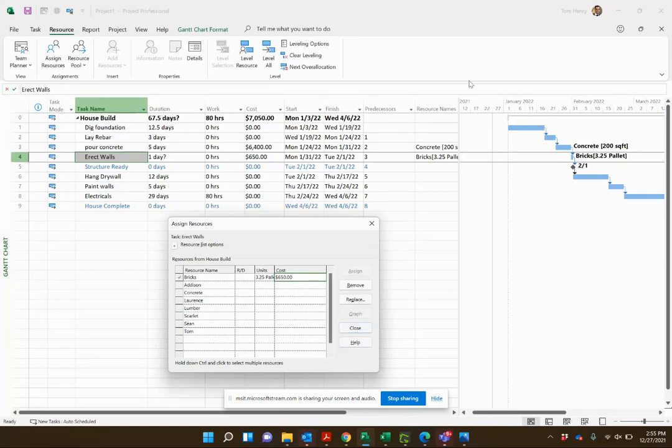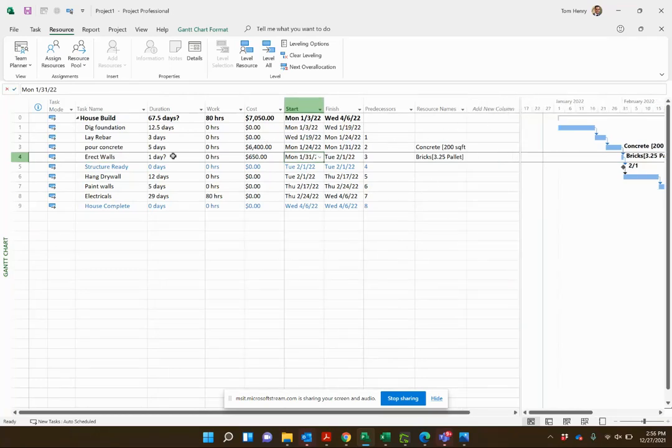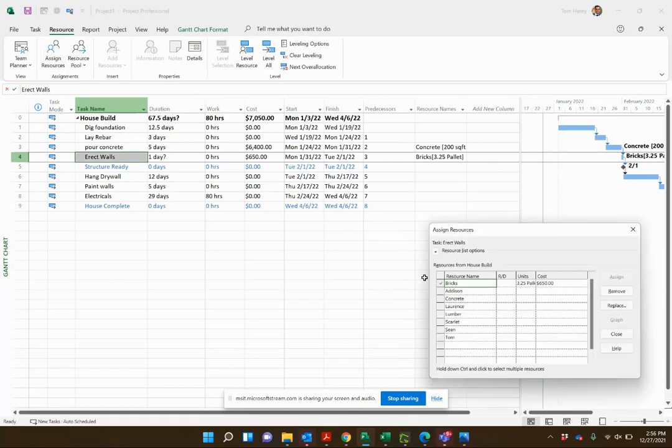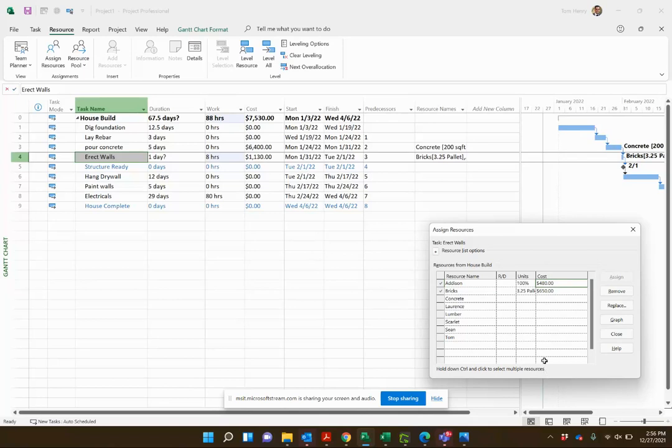That's it, that is our materials. You can assign a material to a task and a person as well. Let's take a look at that. So erect walls, I'm going to say that Addison is going to work on that. Assign. And you can see because she's working full-time on that, hourly rate sixty dollars an hour, it's four hundred eighty dollars for the one-day period.